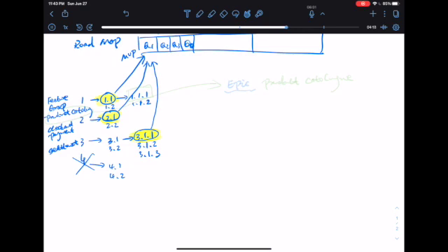So then it comes to Jira, how we're going to break down the Jira. So in Jira, we also have the epic. So yeah, now I'm going to say again, it really depends on your company. So the epic can be, I would say, just your feature group. So for example, my feature group is product catalog. So I can just say the epic is product catalog.